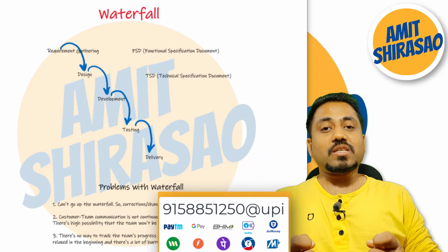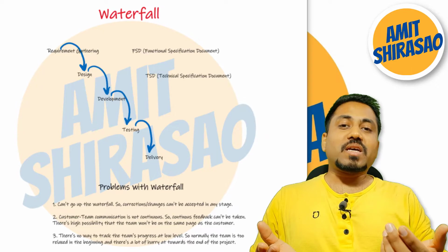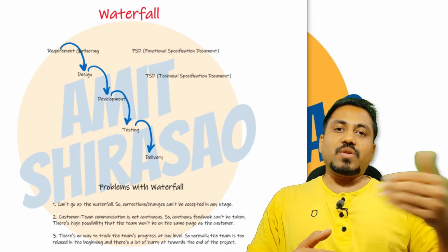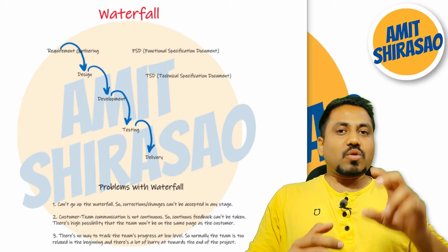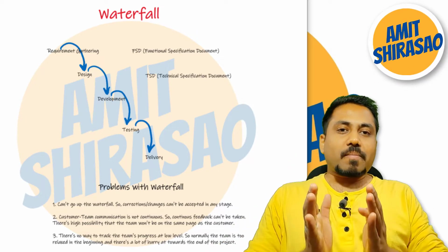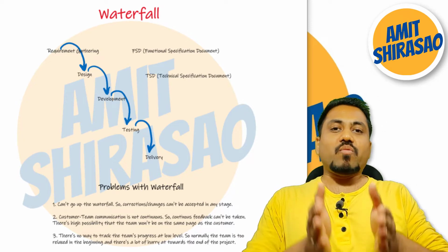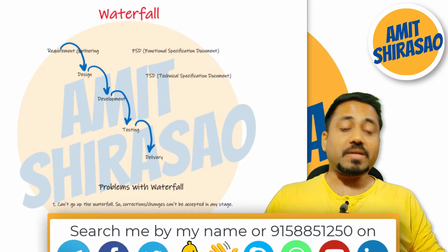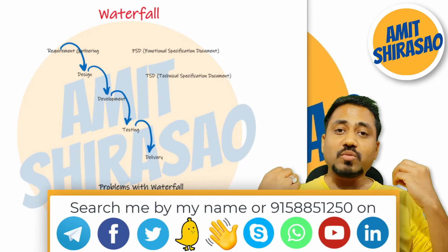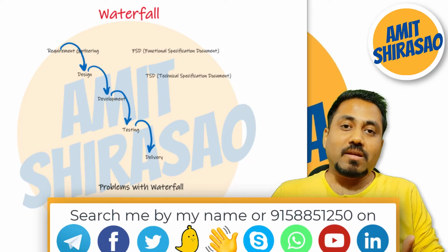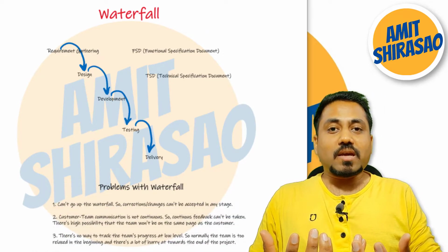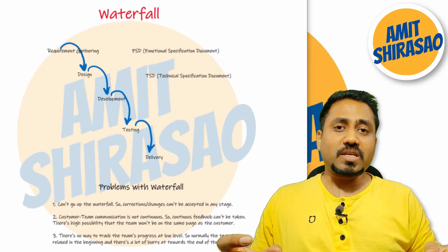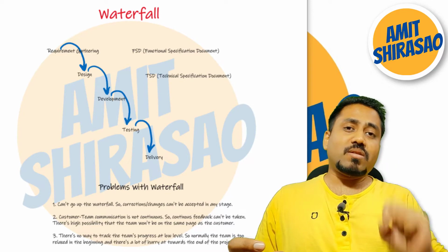They might be asked for the status, where are you, and the developer can just say, okay, I made the database, I made the intermediate layer, I made the service. But they are not vertically slicing it. They are not saying, I have made a working piece of code which has all four layers. No, that approach is not there. The developer can say for the first 2 months, I only made the database, and for the next 2 months, now I'm making the intermediate layer, I'm just configuring it. Then he can say, now I'm making the service.